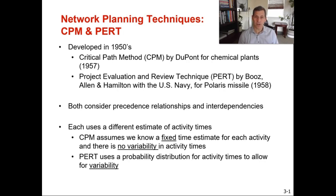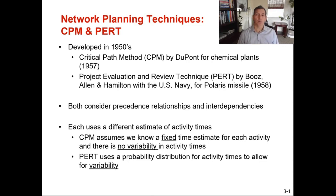PERT uses a probability distribution for activity times to allow for some variability. It assumes that there's a pessimistic time, a most likely time, and an optimistic time — so your worst case, your normal case, and your best case scenarios. For that same project, if you assume it's going to take 16 weeks, PERT will tell us what's the probability that it actually happens in 16 weeks — is there a 95% probability or a 70% probability that it's going to be on time? And then how do we correct it? What activities do we look at to try and improve that probability?